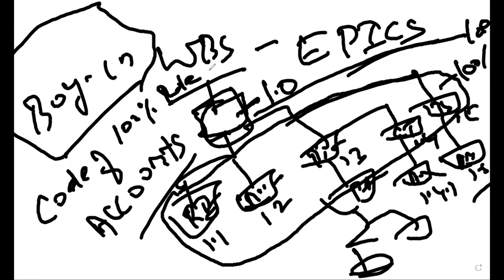So once you add up all the components in the lowest level, that should give 100% of the work. Once you take the next level, one level above, that should give 100%. And once you take it to the project level, that is the last level, the total project should be planned for 100%, not less, not more. So this kind of rule is called the 100% rule. Is it clear or not, guys?